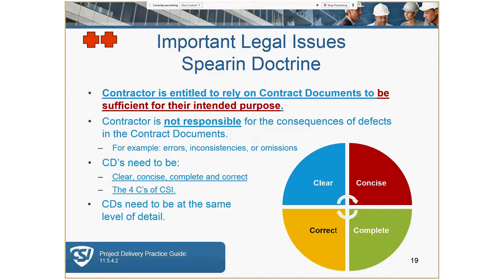The Spearin Doctrine comes from an old case that basically says the contractor is not responsible for the consequences of defects in the contract documents. The contractor is entitled to rely upon the drawings and specifications for their intended purpose. The four Cs of the CSI world — clear, concise, correct, and complete — I suggest you commit them to memory, not just for the test, but for your practice every day. Every drawing, every set of drawings, every spec — keep those four Cs in mind.